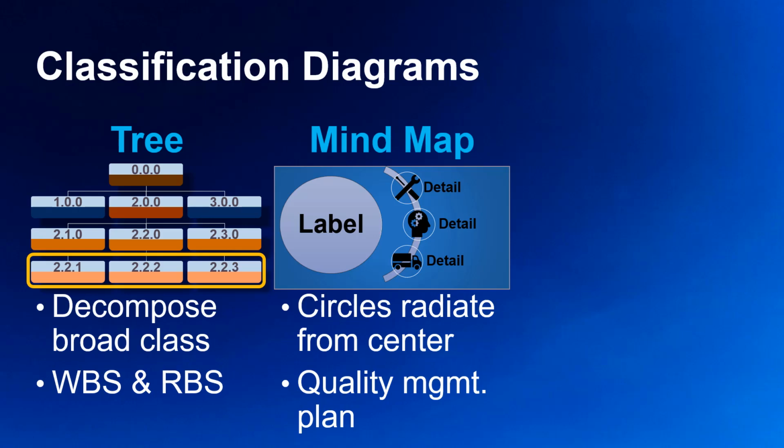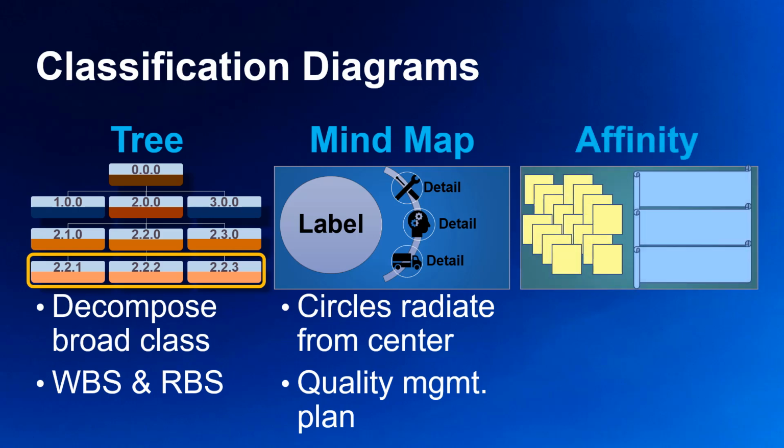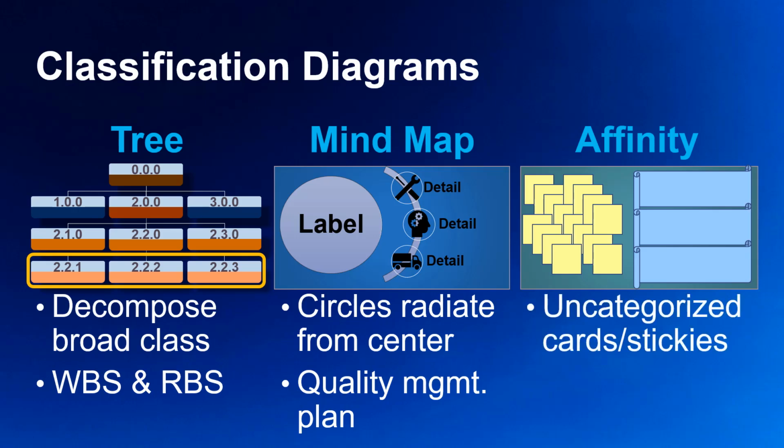In tandem with brainstorming, we use affinity diagramming to organize long lists of items where you don't initially know what the categories are. We use this technique to come up with practical use labels of tools to analyze quality data. Uncategorized items may be written onto cards or sticky notes. The team works to find affinities between these items, moving the items into groups that appear related. For the managed quality process, you can use these tools to organize the causes of defects, for example.